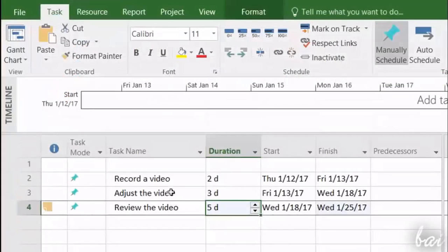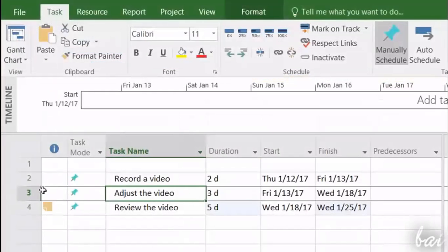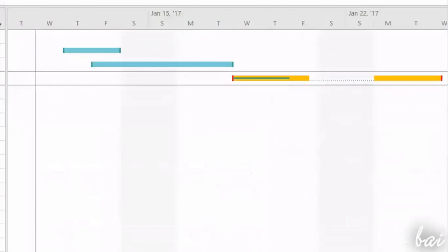In case you have tasks that are dependent, for example, when one can't start if another one is not finished yet, you can use the links. To create a link, you have to first select all the tasks that are dependent. Just hold Control down and select all the tasks in the correct order. Then just click on Link the Selected Tasks. In the Gantt chart, all links are indicated through arrows, indicating the type of dependence.